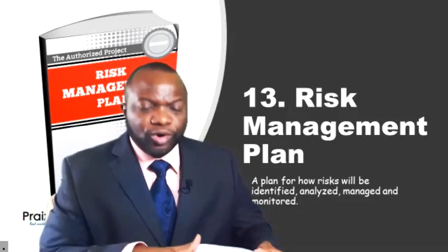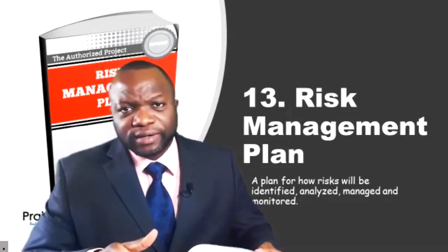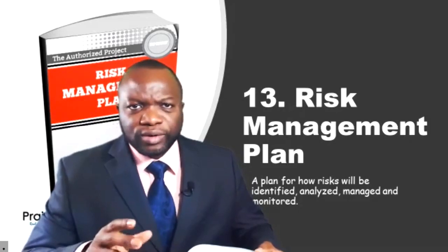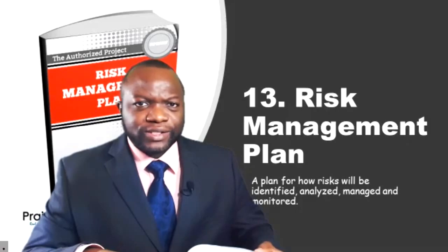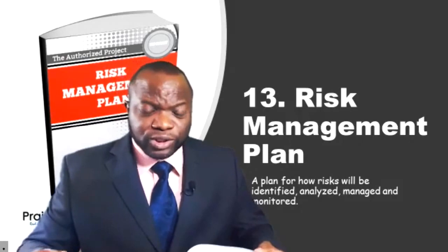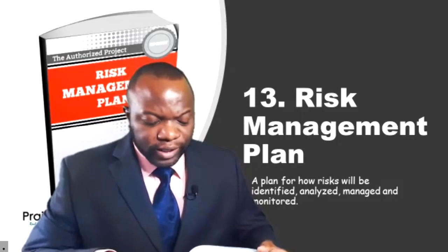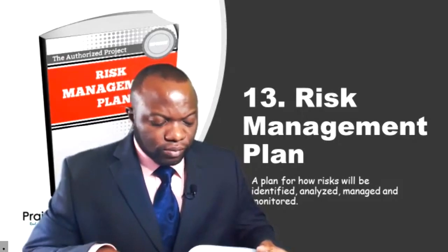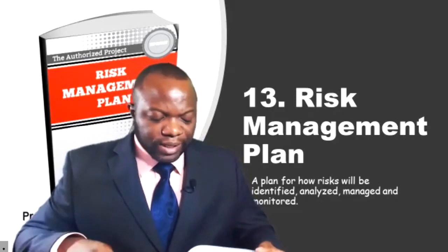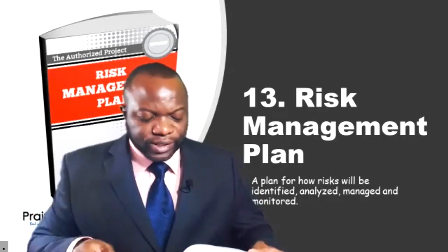The third bullet is roles and responsibilities. Who will do what in terms of risk? The fourth is funding. Where do we get funding from? I've heard from the past that students say, Phil, we do not manage risks in a calculated fashion because we don't have the funds to do it. Now, while that's a bit blown out of proportion, there does need to be funding to perform activities related to project risk management. Timing. How frequent will these activities take place on the project? And the last bullet on page 405 addresses risk categories.